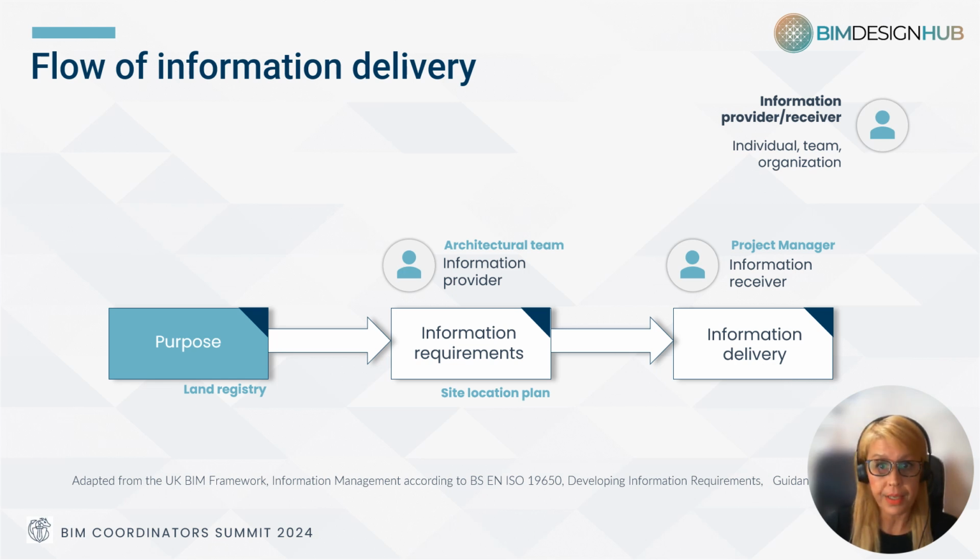The information receiver, for example the project manager, requests a site location plan for the purpose of statutory approvals and land registry. The information provider, in this case the architectural team, prepares the site location plan and delivers the information to the information receiver.